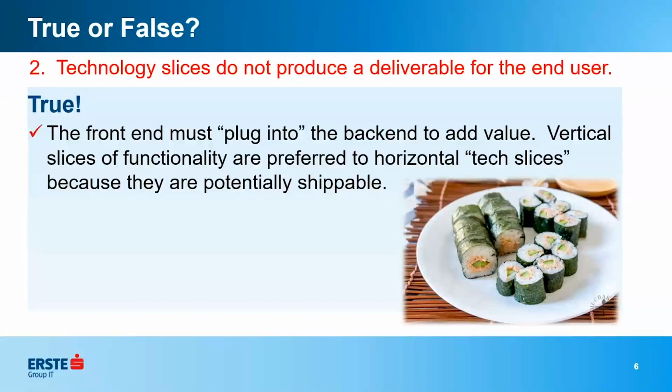And vice versa. If the front end is done, but the back end work hasn't been done yet, then as a user, I don't have anything valuable yet. So stories should have the whole package. They should be sliced small enough that front end, back end, whatever other elements need to come into place in order for that story to be done is completed in one story. So remember that not everything in a sprint has to be a story. So if you're finding things like, we want to do this little thing and test this out, that's a task, right?